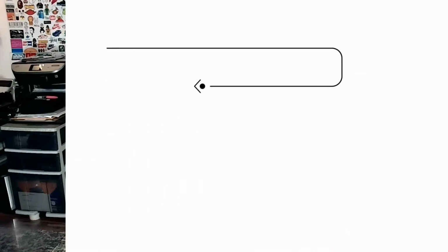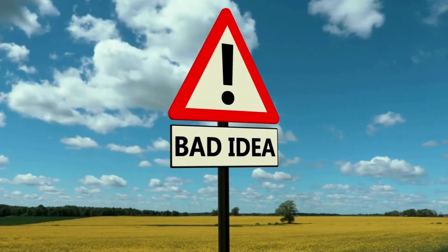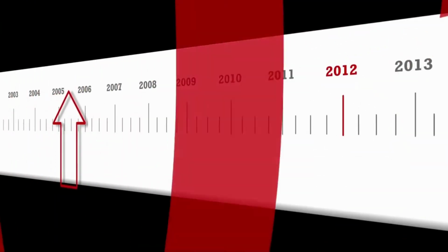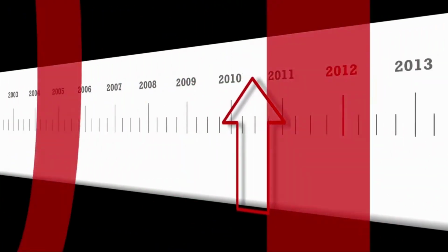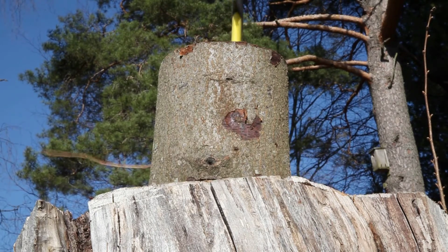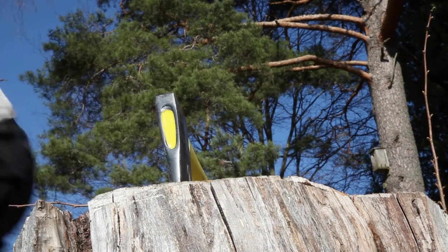One of the first things your solution architect will try to determine is whether your project timeline is realistic based on the scope. For example, if you're implementing the entire Dynamics 365 stack and have allocated 3 months, probably not realistic. Likewise, if you're going for a big bang and planned a 3-year project, your architect will probably want to talk about a phased approach and breaking the project into multiple milestones and reducing risk to the project while accelerating the value to the business faster.